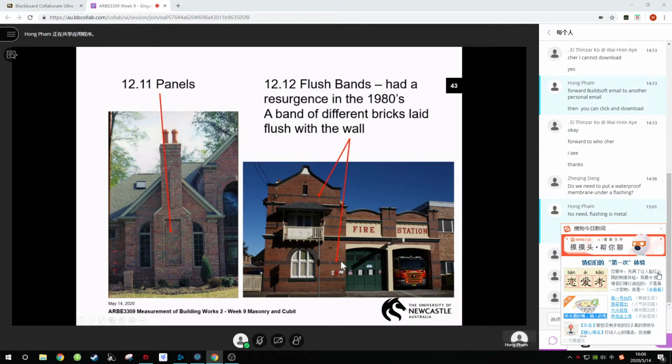So remember, guys, how do you measure masonry? Always think of it in an overall view: you always measure the majority first. So the majority are the walls. After all the walls, you have the decorations and accessories, like the flush band, the cornices, the string courses, capping. All these accessories will be measured additionally in meter run. And of course, you need to minus away their quantities from the main brick walls.